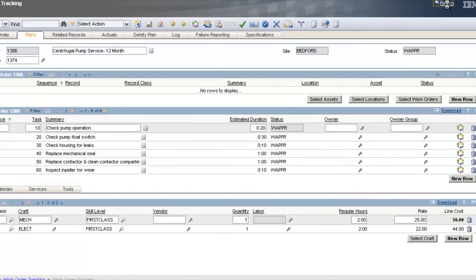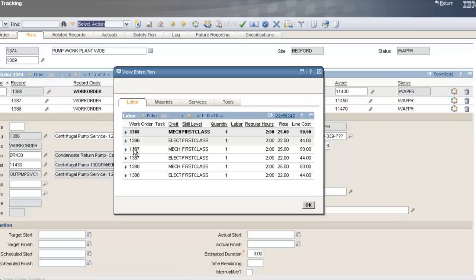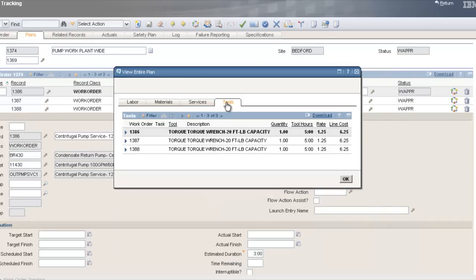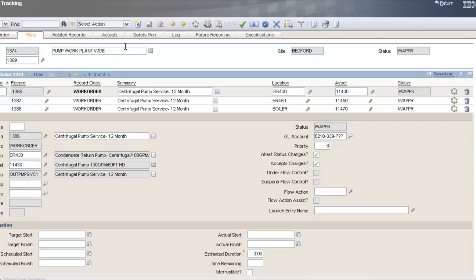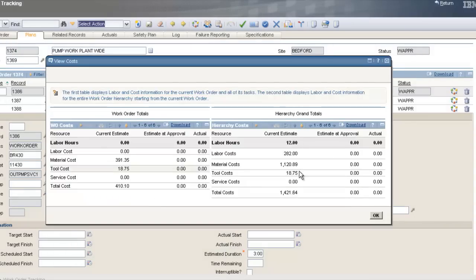Now we'll march up the hierarchy to the department work order for pumps. Click Select Actions, View, Entire Plan — this shows all the work orders that make up the project at this level, all the labor required, all materials for the entire pump department, and all tools needed. I need three torque wrenches — you can see how everything adds up and moves up the hierarchy. Under Select Actions, View, Costs, this totals all the work orders in the entire department for the outage and shows the total cost of all work being done.